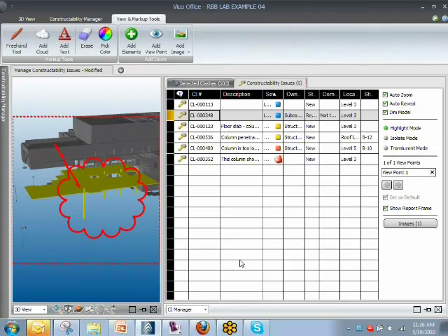It is possible to add constructability issues manually. So that really mimics what the services team has done a lot over the last couple of years, which is converting 2D drawings into a 3D model, finding where the issues are by building it virtually, and then placing constructability markers in the model where you find a problem. So there's no automated clash detection, it's really human clash detection.